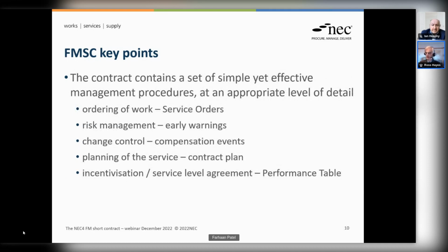And then going on a little bit, it has the processes that you would expect in a contract, but they're not necessarily as fully developed as you might expect in a big complex contract. So we've got the ability to order work, and we've got something that is new to the whole of the FM suite, the concept of a service order. A service order is an instruction, as we'll see, to call off a piece of work. I would like you to go and fix this tap at a particular house. I've got a special party tonight, so can you provide catering facilities or functions tonight? I've got somebody coming specially around our buildings, so we need security staff on after hours tonight. So there's a call off service order type approach.